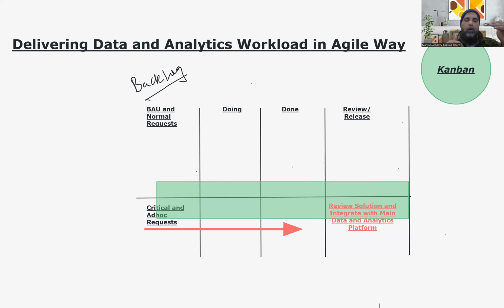So they can pick by priority. Whatever priority they give us, we take the top priority based on the time frame of the sprint that we can adjust, and then we work on them. In the next sprint, we take the remaining priority or just discuss with them. So anyway, that's the agile way. We will discuss it in a separate video.